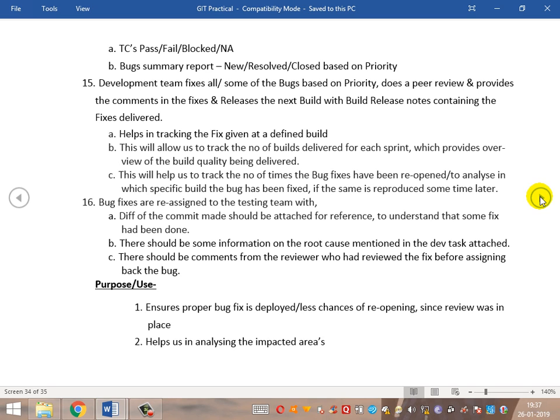By following this complete process, it ensures a quality build. Once all fixes have been completed and all risk cases executed, the build is declared ready. The next process to be in place is that the BA needs to give a walkthrough to the product owner, the client support person who gave the actual requirement, and all the dev and QA teams before the release.